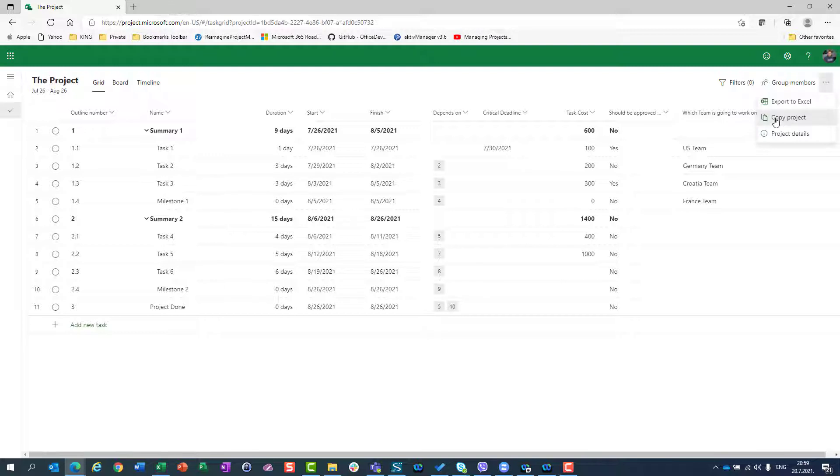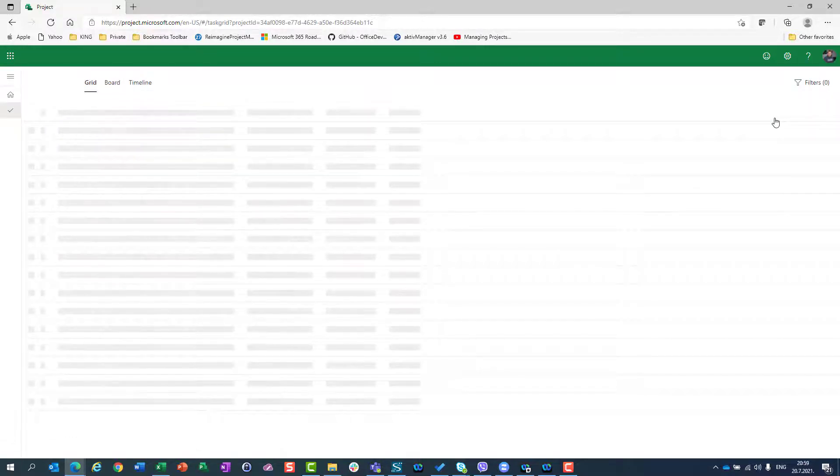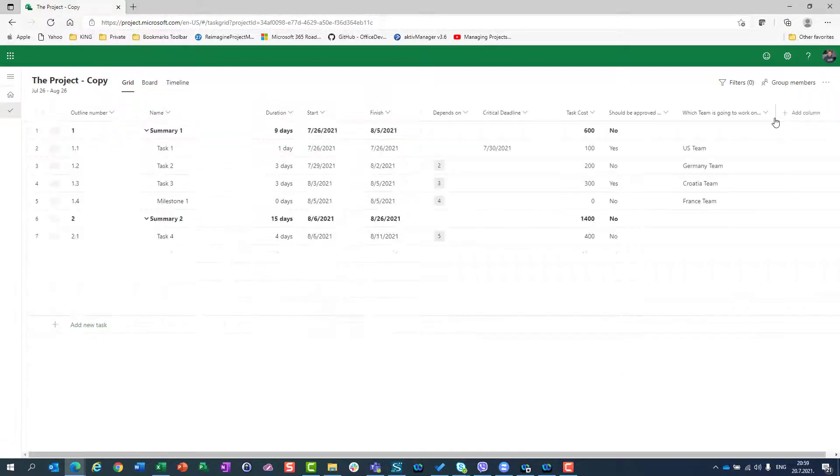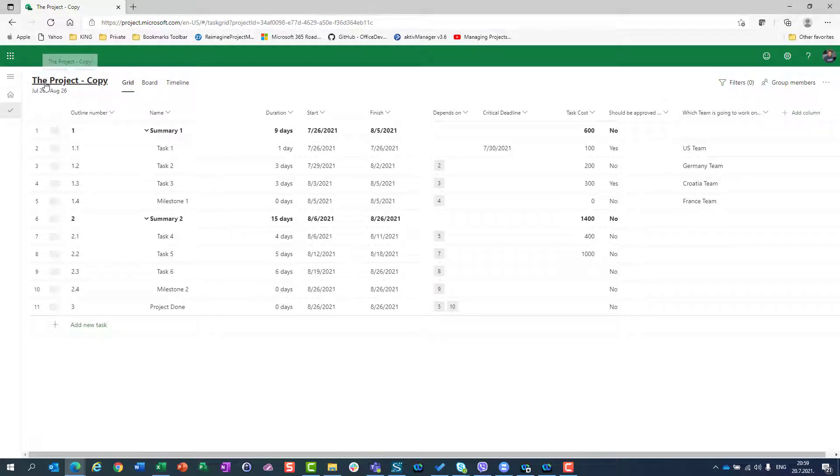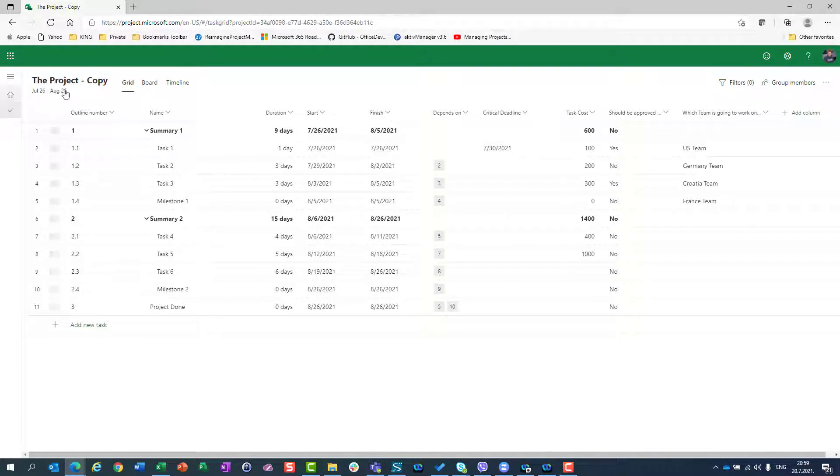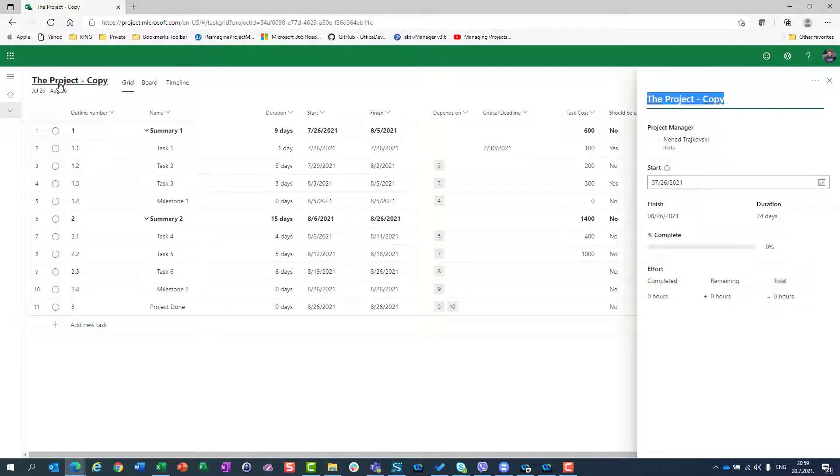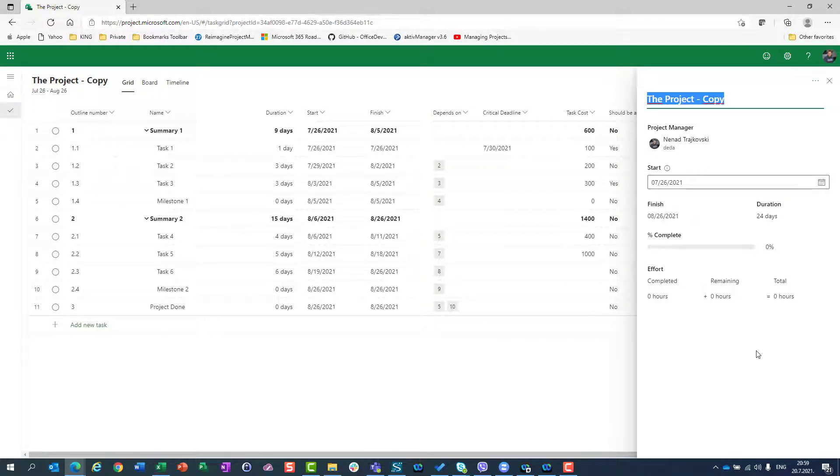I'll click on copy project and immediately have the project with the same name as the original but with 'copy' extension. I can rename it - that's the first thing you should do. I'll call this my second project.